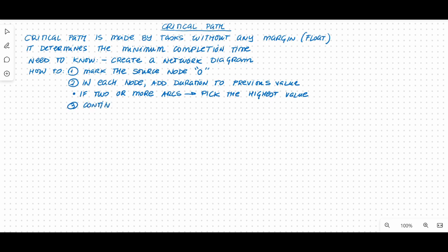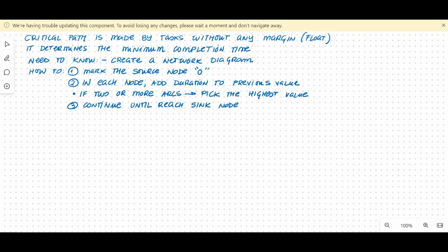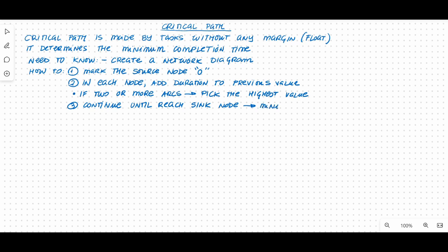You're going to continue that way until you reach your sink node, your end. And that is going to tell you how much time you need to complete your project. And we call that minimum completion time.